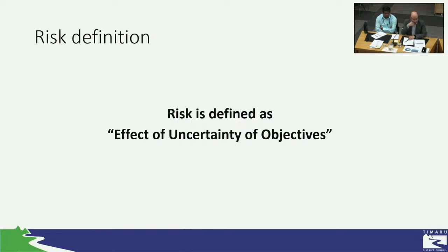So if I have an example, we say that a risk might be new legislation imposes additional financial and reporting requirements that are not met. When you think about this statement as a risk, what will be the objective? The objective might be legislative compliance. But when you think about it, this statement is a cause, it's not a risk, because any change in legislation must have additional financial or administration reporting requirements. So my risk is not the legislation itself; my risk is non-compliance with legislation, because my objective is that I need to be in compliance.